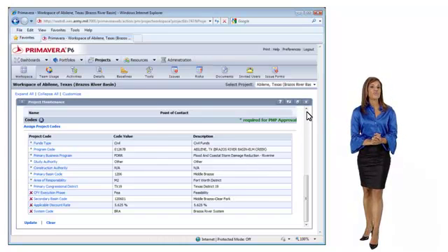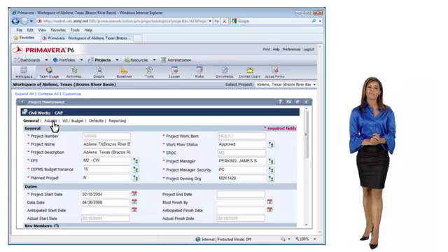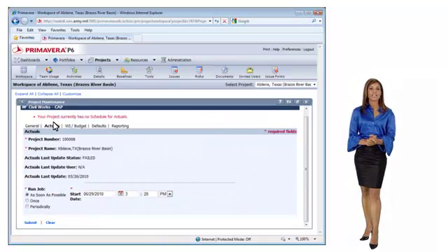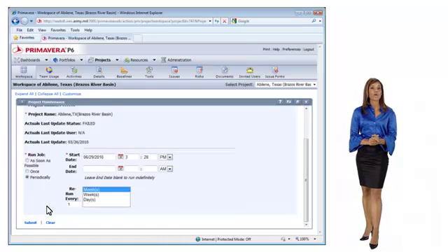Let me show you the new way to update actuals in project maintenance. With P2v3, actual costs are retrieved nightly from CFUMS and stored outside of your project. Now you have the power to select when you are ready to transfer actual costs to your project. You can select to transfer actual costs to Primavera immediately, once on a specified date, or periodically on a schedule that you determine will meet your needs.